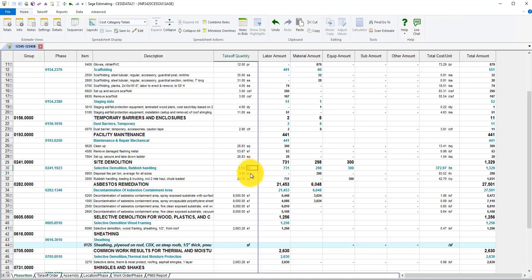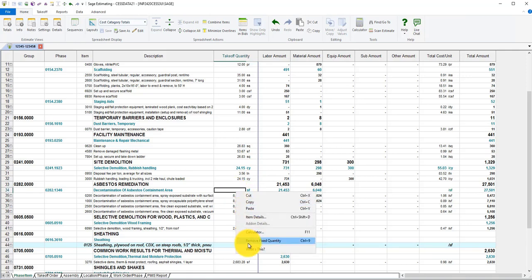If we wanted to calculate the cubic yards in the overline, we just match the cubic yards and the line items below it, change this to CY, and it auto-calculates exactly the way the checkbox expresses. It auto-calculates the overline quantity by matching the unit. If we use square feet here and ask it to auto-calculate by removing the fixed quantity, sure enough, it picks up every numeric value that has a corresponding SF.